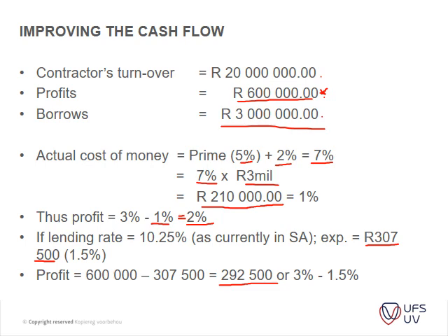So just to illustrate that to you, it's not 1.5, it's 50% compared to 33% of your profit that you actually got in the end. So it's half of your profit that was eaten away by interest. That's just something to take note of, how easily the lending rates can influence your cash flow on a project, or your profit. So please be aware of that.